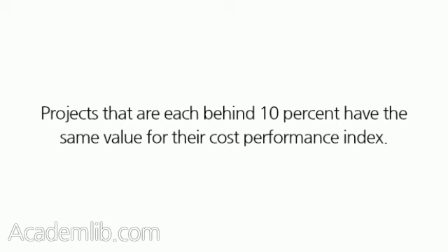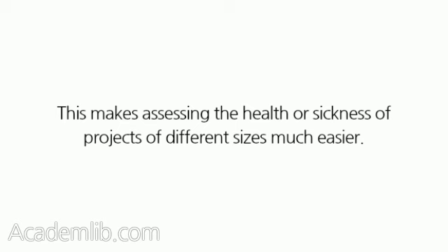Notice that the size of the project does not make any difference in the calculation of the index. Projects that are each behind 10% have the same value for their cost performance index. This makes assessing the health or sickness of projects of different sizes much easier.